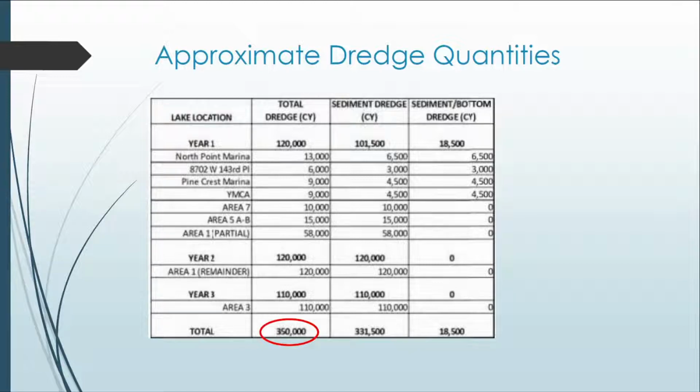So over a 3-year period, you get ultimately 350,000 net cubic yards of sediment deposition. So we're actually going to be sucking out more than 350,000 cubic yards. It's the consolidated volume that would be in that basin at the end of the project.